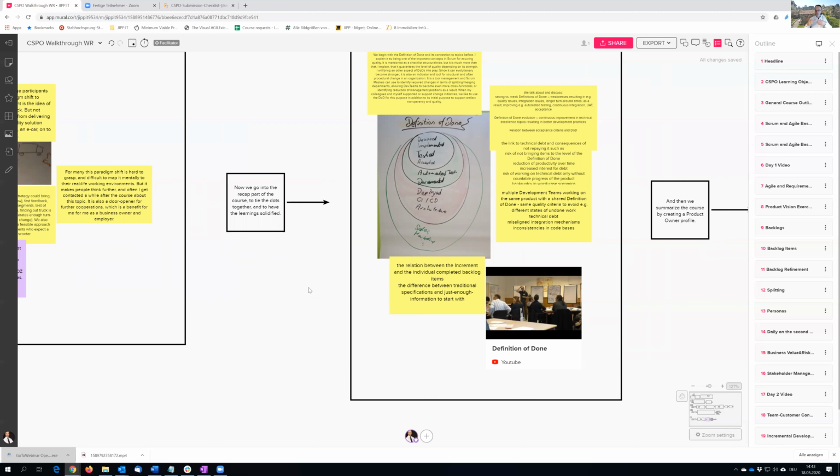So if a team can only start with a weak definition of done, which is not good, and we have this kind of undone work still remaining, or technical debt actually sometimes, we also need to work on getting a stronger definition of done. In an evolutionary concept, we improve the definition of done, like getting automated testing on board, getting architecture into the team, getting documentation into the team, if it's separated at this point in time in an organization.